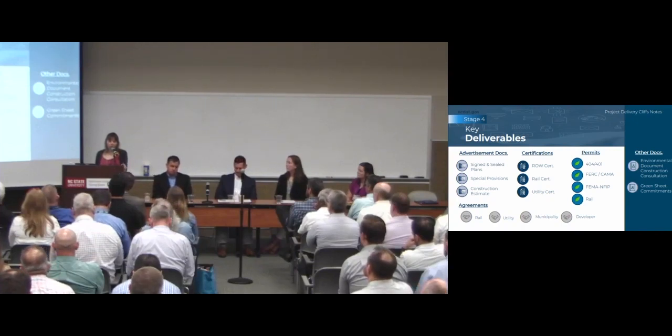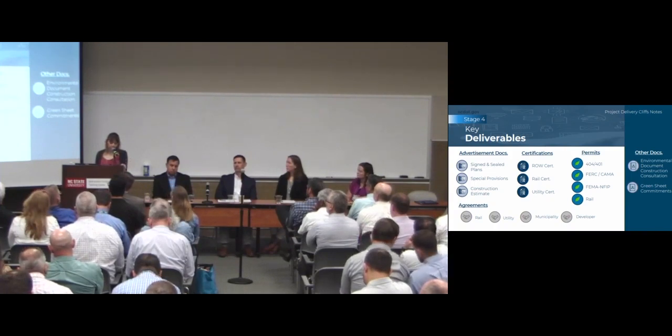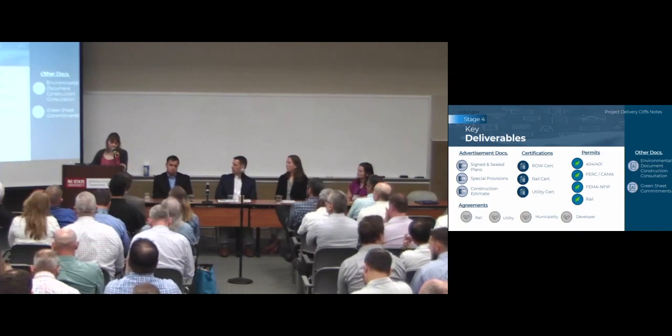We also have rail certifications, which Brian mentioned. Those are required on every project. Any project you do needs a rail cert. The project manager can reach out to the rail or structures management unit to get that done. These do not apply to design build projects. Most of our projects are design bid build at this time, but just so you know that.